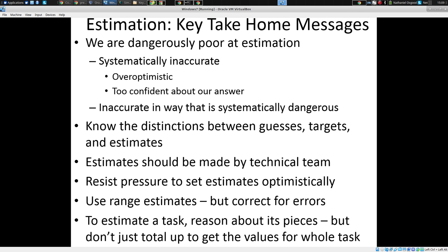One of the keys is to use range estimates, but to do so, and I don't know if we'll get to this today because of the limited time, you have to deal with the phenomena we noted today. These have been 90% range estimates. We would have expected an average count, a single most likely count, would have been up here, 8 or 9. And instead, it was way down here, starting at 3. We tend to give range estimates that are too narrow. We flatter ourselves about how much we know by giving estimates that are too tight.